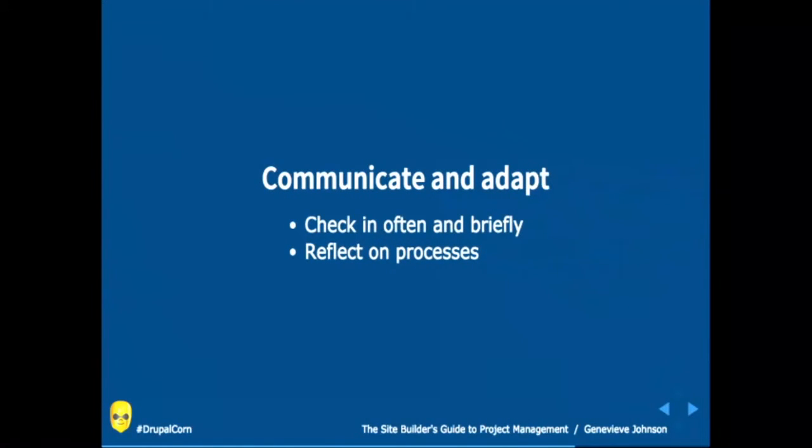So communication is absolutely critical, not just with your clients, but also with your team members. I like to check in often, but very briefly with everyone to see what they're up to and how things are going, and if there's anything I can do to help keep things moving if they've hit a blocker. So maybe once a day, sometimes it gets pushed back to as much as every other day. I'll just check in for about 3 minutes, and it's just a quick, okay, what have you been working on? What is done? Are you stuck on anything? And what are you planning to work on?